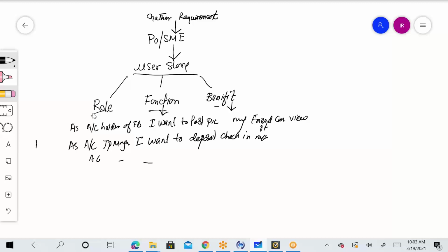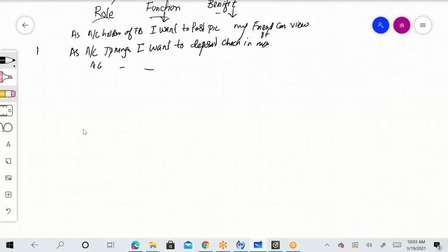Mostly it is your product owner's responsibility. In most cases it is his responsibility to write down these user stories in a tool, because when you're capturing this requirement, there should be a way of documenting them. Now here in Agile, when you're using an iterative method, you're not documenting them in Word. You might put them initially in an Excel sheet one by one, but eventually you have to put these user stories in the Agile management software, where all the team members have access and they can view what is going on.